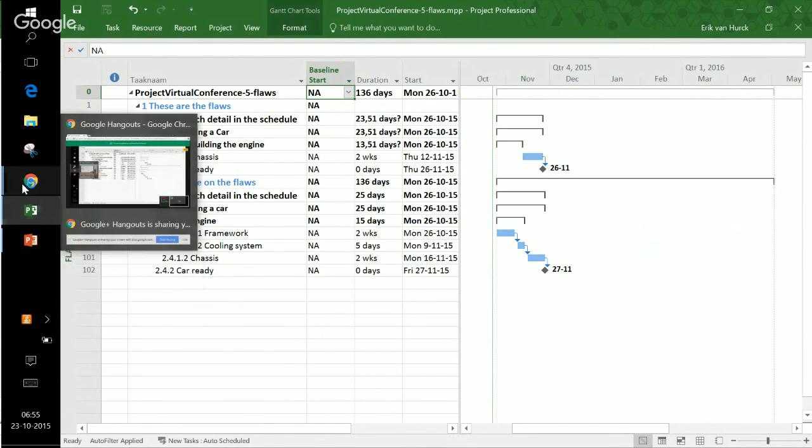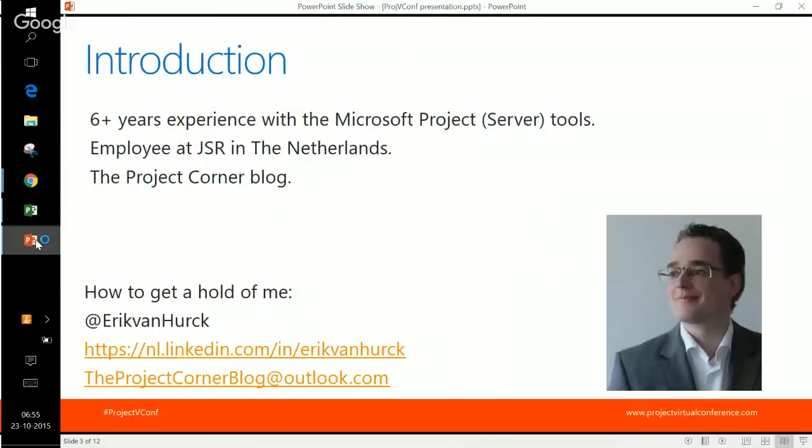into your formula. One of the things we used to do, Eric, if I may add, is look at the date value, just like you said, and compare it with a very high number and use that in a formula. That would get around the whole multi-language scenario, so now we are looking at just numbers.